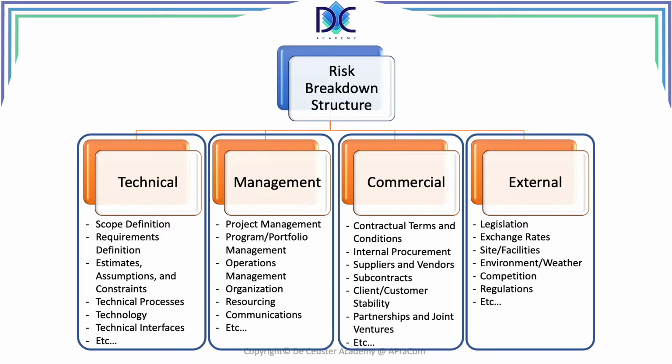I mentioned the risk breakdown structure, so we're looking at different elements that we can in fact consider as risks, and here I have four items: technical risks, management risks, commercial risks, and external risks. We can define them for our project.